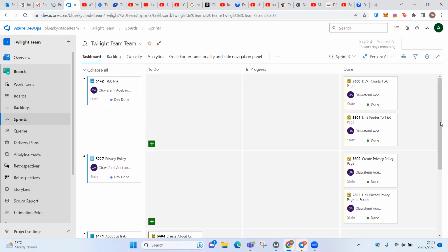When you say they need to do that, do you mean the developer or everyone? The developer. When it comes to the story, you do it together, because not just one person is working on the story. The developer is going to work on the story, and the QA is going to work on the story. But the task is an individual thing, one person carrying out an activity. So it's just the person that creates that task that estimates it in hours: this is how long it's going to take me.